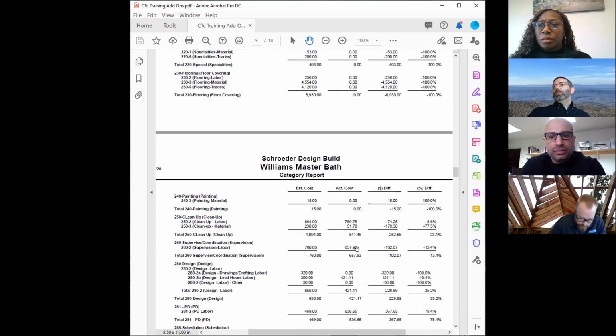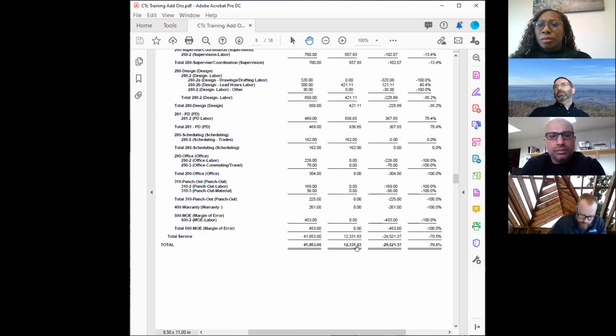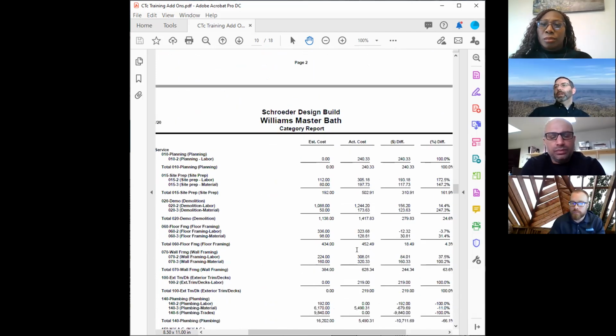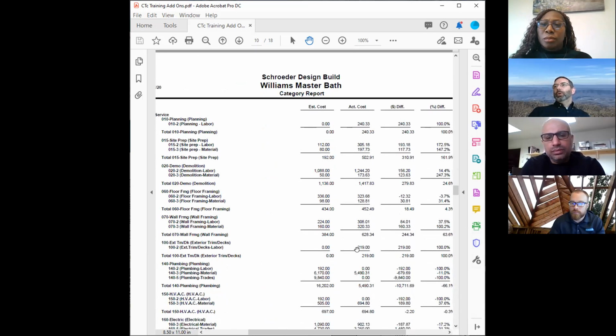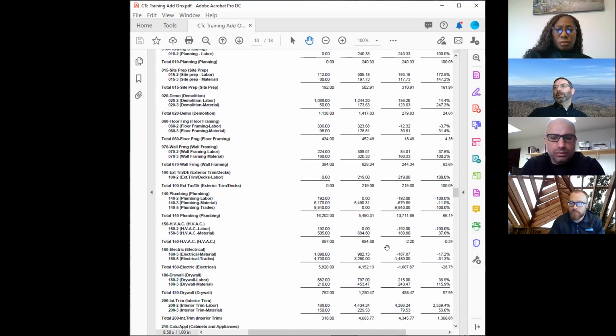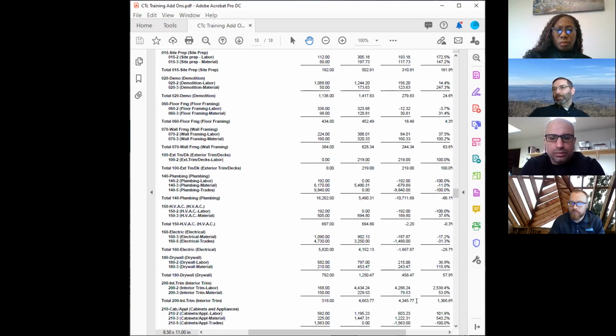Until we go to the next month. And this was a very short project. It happened in a very short amount of time. And then we go back and we look at the next month. We'll notice that all of a sudden, we've still got a little overage here, a little overage here, another little overage here. And then we have a monster. Right? So literally in 4 weeks, this project slipped almost $6,000. 4,300 in that line item alone, so almost 5.